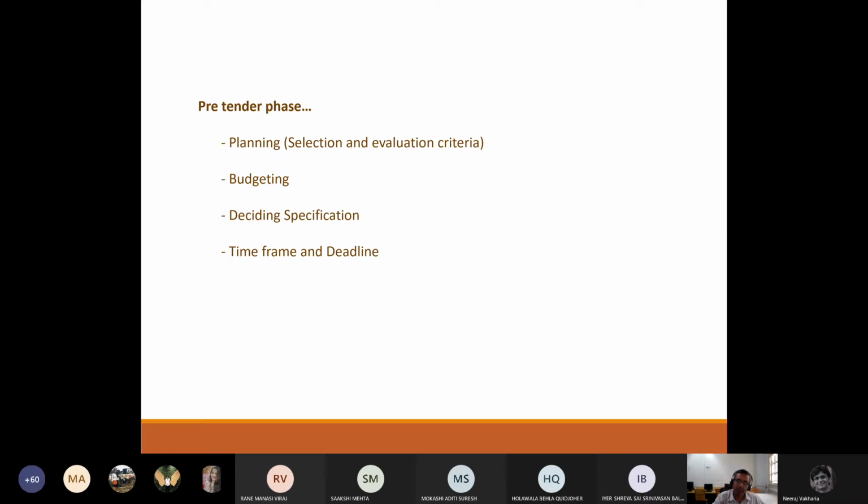So similarly, if the project is of 10 crores, you cannot take a contractor who's done work for a crore. Usually contractors are invited based on the kind of investments they have been associated with in projects. Such a large 10 crore project will require that kind of manpower. And an architect will, sooner or later, have the capacity to know whether this contractor is good enough to manage such a scope of work.